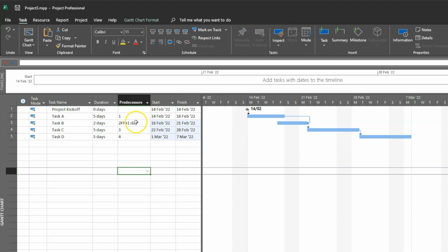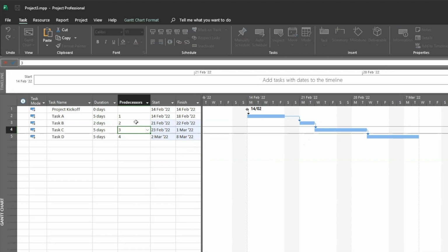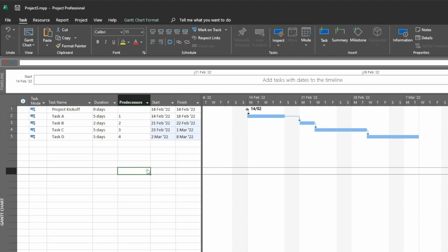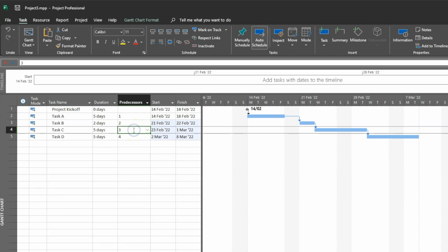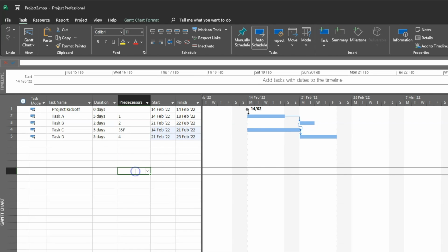The last option is a start to finish predecessor relationship. The relationship requires task B not to be completed until task A starts. An example, I have used this relationship in planning where customer support from one team, task C, on our plan, can only be finished when customer support from the new team, task B, starts. To demonstrate this, we can enter a start to finish relationship by adding the characters SF after the row identifier with or without a lead or lag calculation if required.